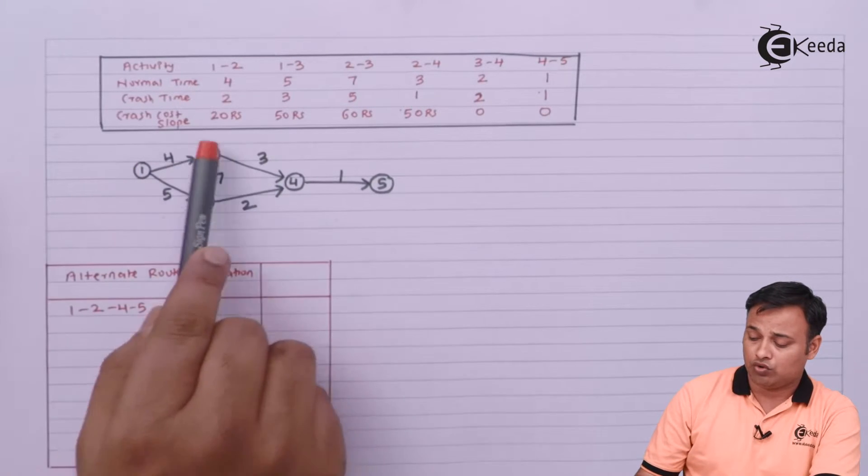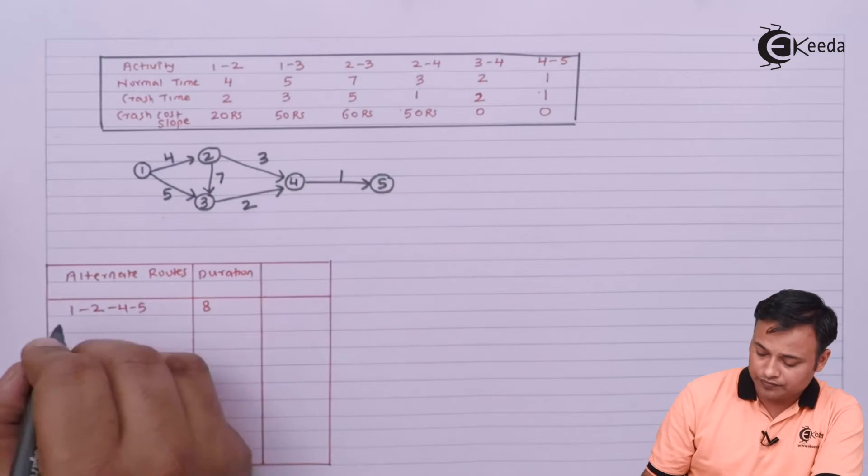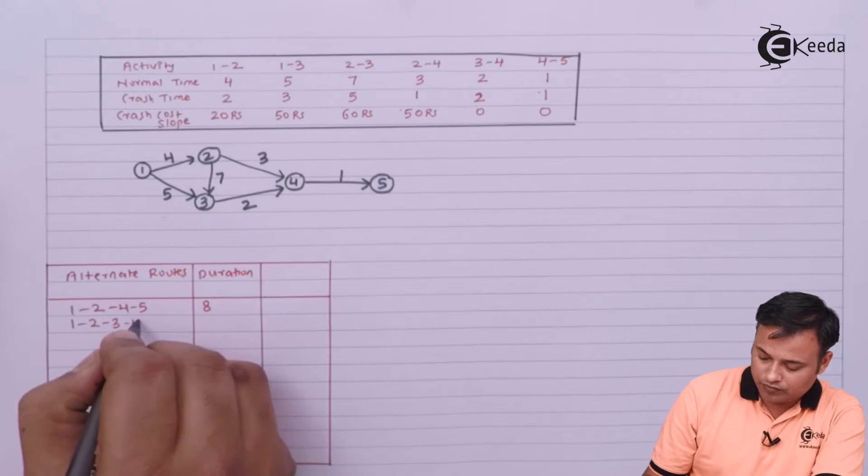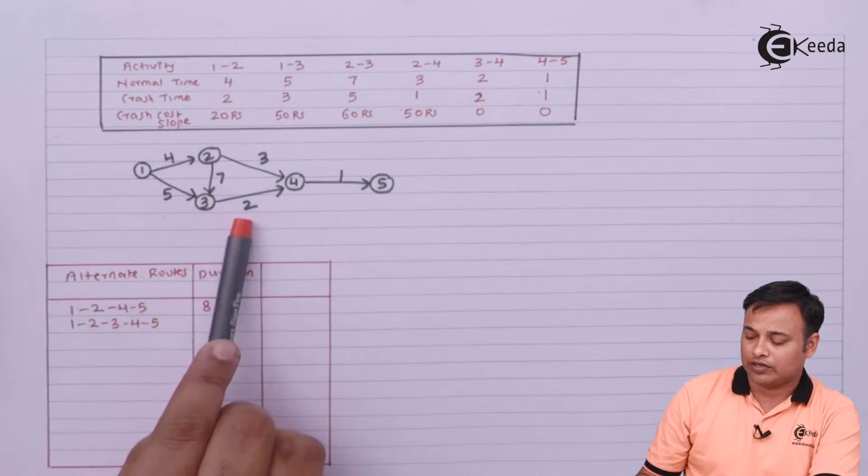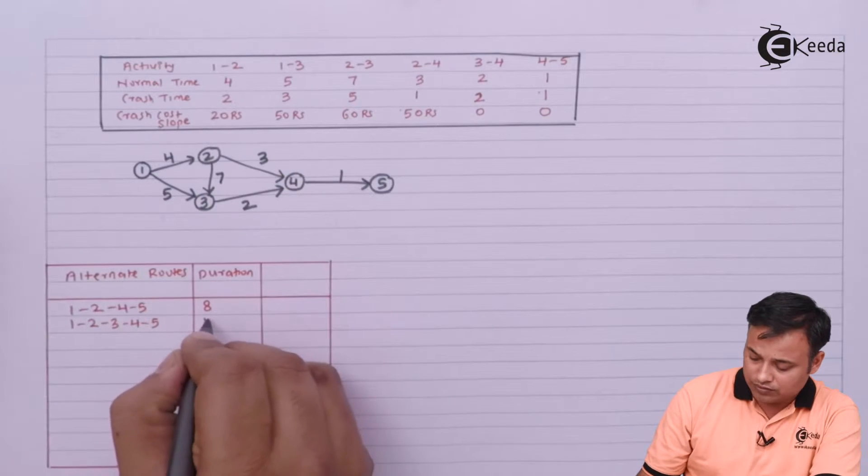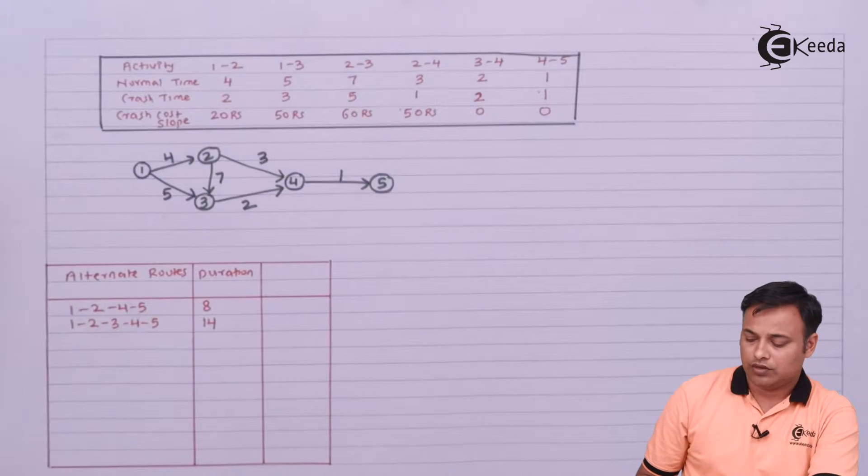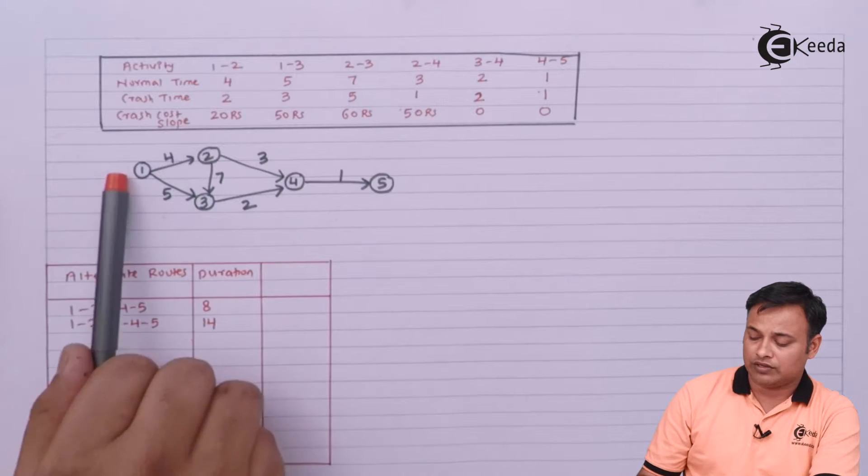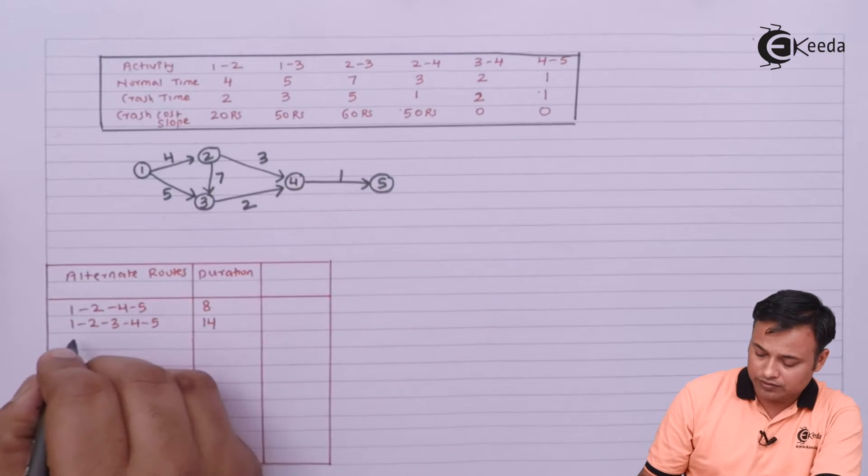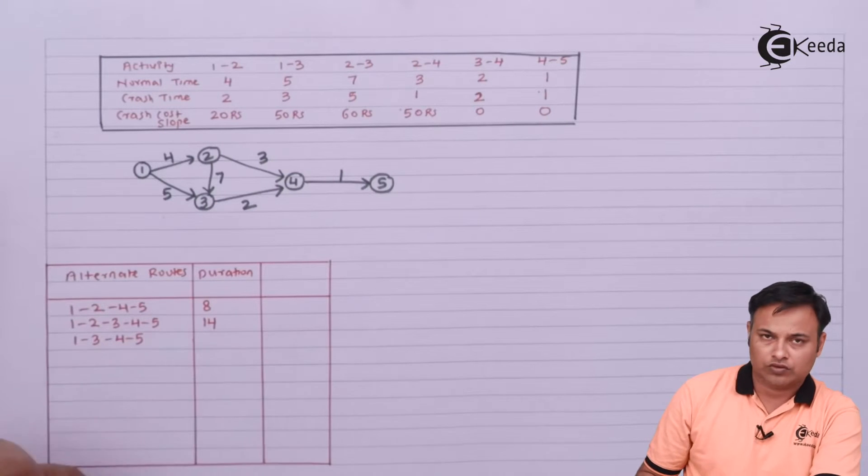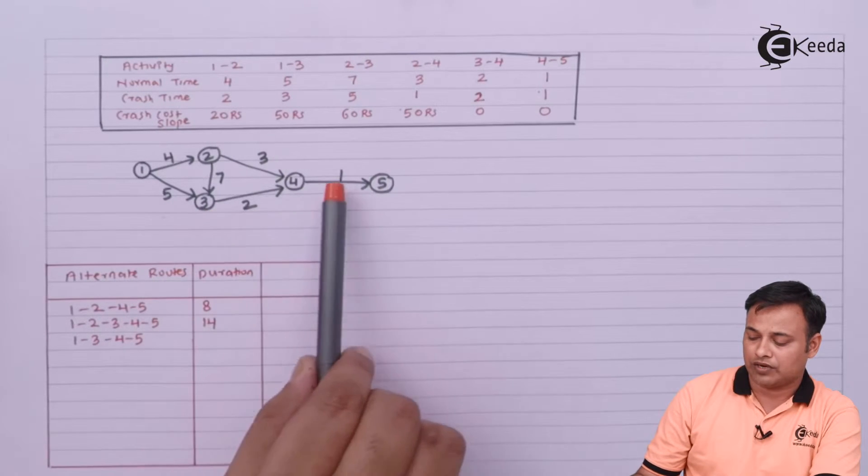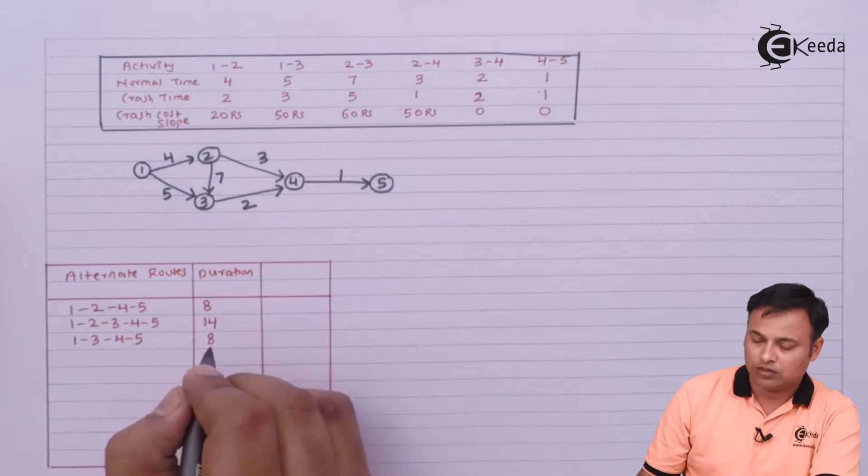My other route will be 1-2-3-4-5. It will be 4 plus 7, 11, 12, 13 plus 1, which is 14. And my third route will be 1-3-4-5. It will be 5 plus 2, 7 plus 1, which is 8.